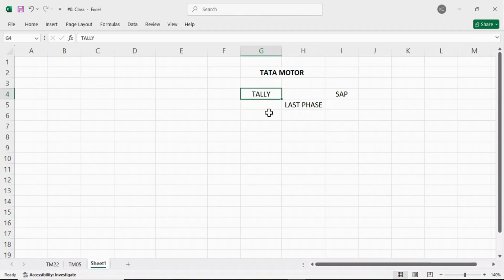But now if you match the overall balances from the legacy system to the SAP system, and the users keep on using the legacy system, guys, the data will not match. A particular data is migrated, whereas the end user has posted some new data. So a different balance will be here, and a different balance will be there. So that's the reason.